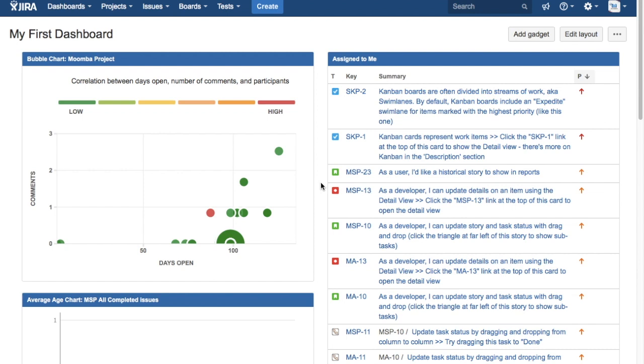Release manager needs to manage what all issues, tasks, and user stories are part of the particular release so that they can track the progress and see whether that particular release is completed and ready to be deployed. That's the whole purpose of having versions and releases in Jira or in agile projects.